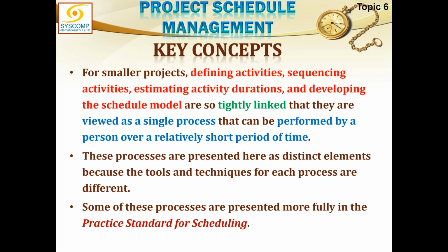You decide that I cannot squeeze this project more than 4 months. Squeezing it further is dangerous for the project. This cannot be done. Impossible. So you have now decided that the best time to do this project is 6 months. Minimum it can be done in 4 months, and maximum it can be done in 12 months.